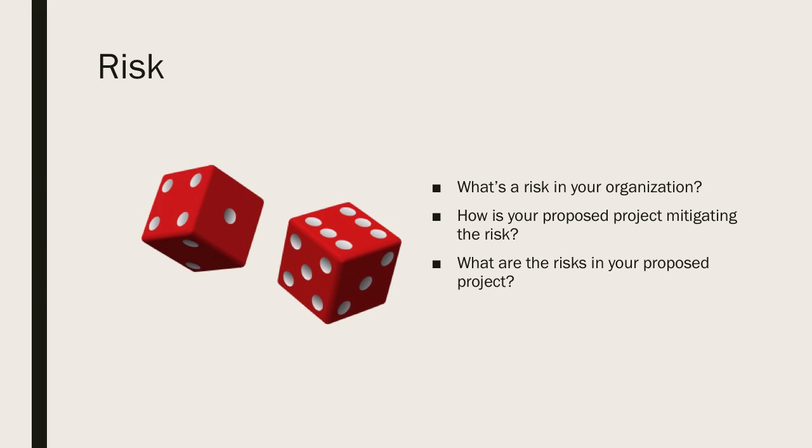So the next thing I wanted to talk about when it comes to risk is that when you're proposing a project that mitigates risk, it's a good idea to have some risk of that project associated in your proposal. Every project, no matter how simple, has risk. If you come to a mature management team with a proposal and you don't have any associated risk, you stand a pretty good chance of getting challenged. Let's take our vSphere cluster upgrade, for example. Every time we shut down a server, every time we open a chassis, there's risk associated with doing so. There's risk of having bad memory. The risk doesn't have to be great. We can weight that risk medium, high, low. In most cases, doing a simple memory upgrade is low.